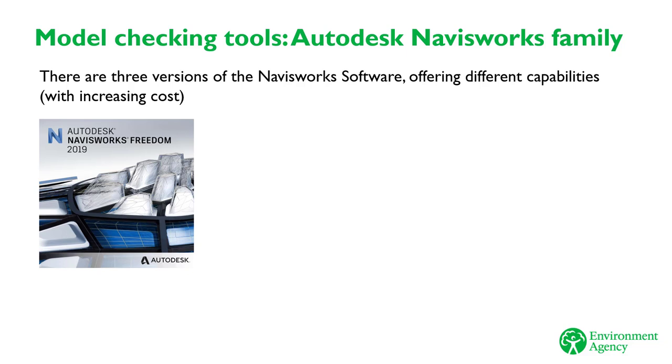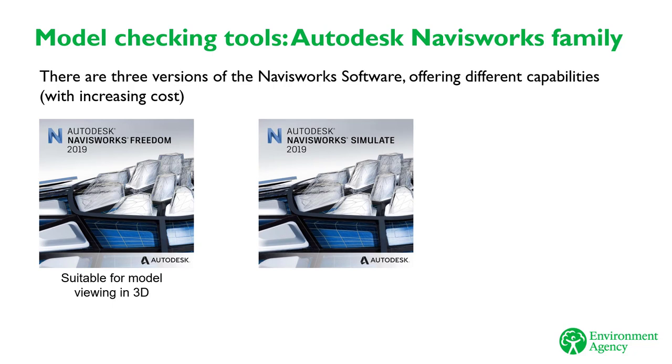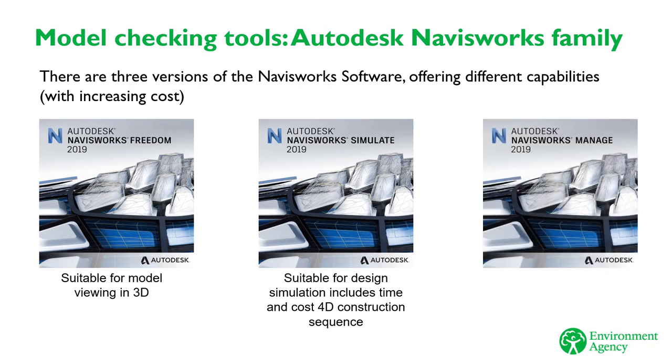Autodesk provides three variations of Navisworks. Navisworks Freedom offers model viewing capability. This is the free version to enable stakeholders to have access to the federated and individual model files curated by the lead designer, BIM coordinator, or information manager. Navisworks Simulate offers design simulation and project review functionalities. It is an advanced coordination tool with 4D and 5D analysis, which includes time and cost data.